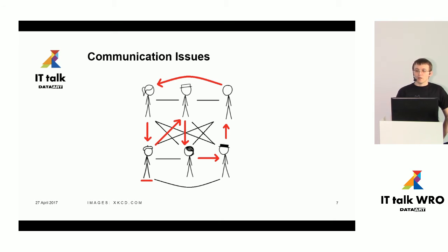One more thing is that with diversified roles, it's hard to keep everyone informed well. There are two issues with that. The first of them is underinforming, when you simply don't know that somebody is going to be interested in that information. Information is not shared, people are not aware of something, and it makes life harder for them. But the other issue is overinforming. As you don't normally know who does what outside of your role, it may happen that you're just adding the whole group to CC of an email conversation.